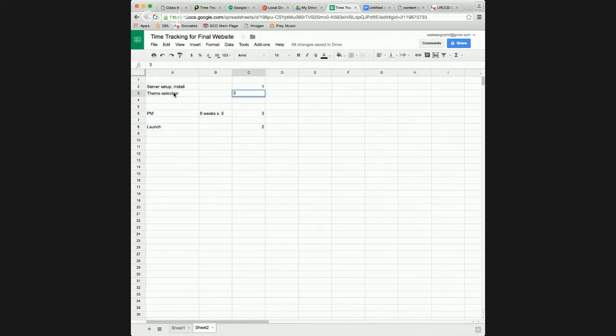And then I'm installing the themes, activating the theme, taking a screenshot, activating the next theme, taking a screenshot, and writing a paragraph on each one. So I might even bump that up to 4 hours. Right? So there's theme selection, plugin selection, and install. We already know the basic 4 we're going to use. Say there's one new one that you have to install. So we might make that 2 hours.